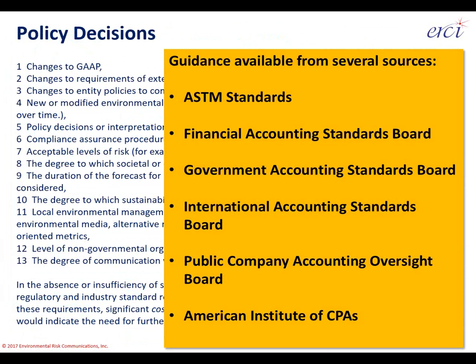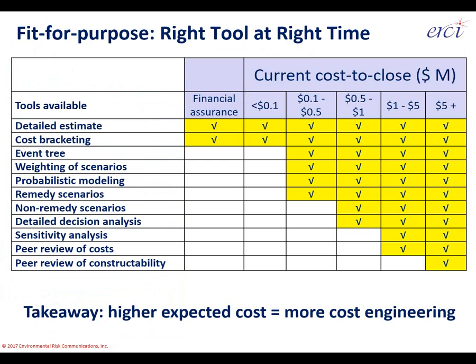Over time you'll find different tools are brought in based on the size and materiality of an environmental liability. Across the top are different costs to close: under $100K, $100K to $500K, on up to $5 million plus. These are not hard and fast rules, but experience-driven guidance. For example, you can expect to develop an event tree for a $100,000 site — under that threshold it's probably not an effective investment. For a million-dollar site, you can expect to do a sensitivity analysis, peer review of costs, and constructability review.